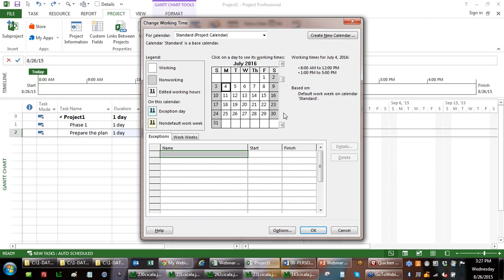Okay, so we strongly recommend that we get to, as a matter of fact, I'd like to ask this question, what's 5 times 8 times 52? And most people know that to be, especially project managers, 2,080. Okay, so what we have is a default productive resource capability, because this is your inventory. When we get to resource management, this is your inventory of available breathing widgets. Okay, it's your warehouse. So your capacity of your resources, when we get to balancing demand versus capacity, is going to come from the calendar. Okay, so there's a lot we can do on that.